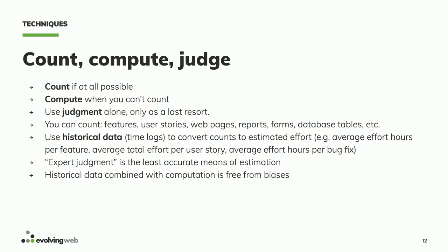But this Google thing, it takes 1 second, and there's no excuse not to do it. Another thing that you can do often, even without access to the back end of a site, is you can say, how many content types do you guys have? How many languages? How many modules, contributed and custom? We ask this to our clients when we do estimation, even if they won't give us the code.